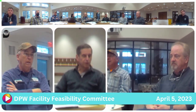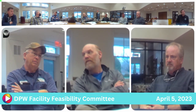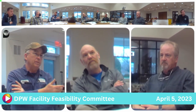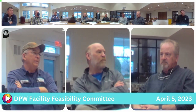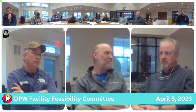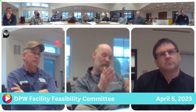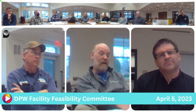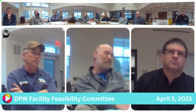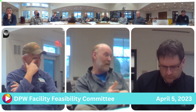The prevailing wage has a big deal to do with it, Deacon. The state's giving you money, and basically you're paying union costs. Plus, when you're working with a private owner and a private contractor, you can negotiate. You can say, no, that should be this, and you can change things. When it's a public bid, you're defining what that is in the documents, and that's it. I mean, there are change orders after that, but you can't negotiate it down from there.